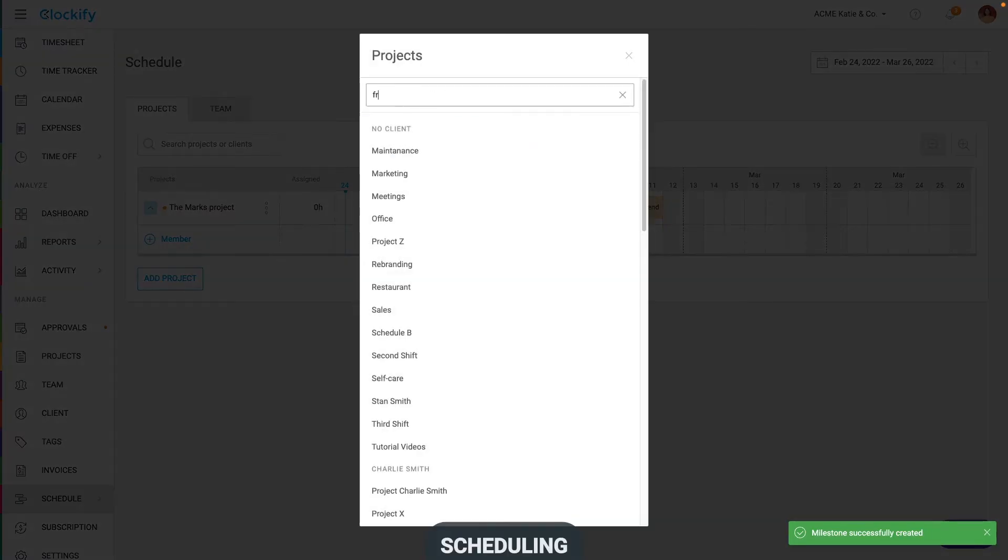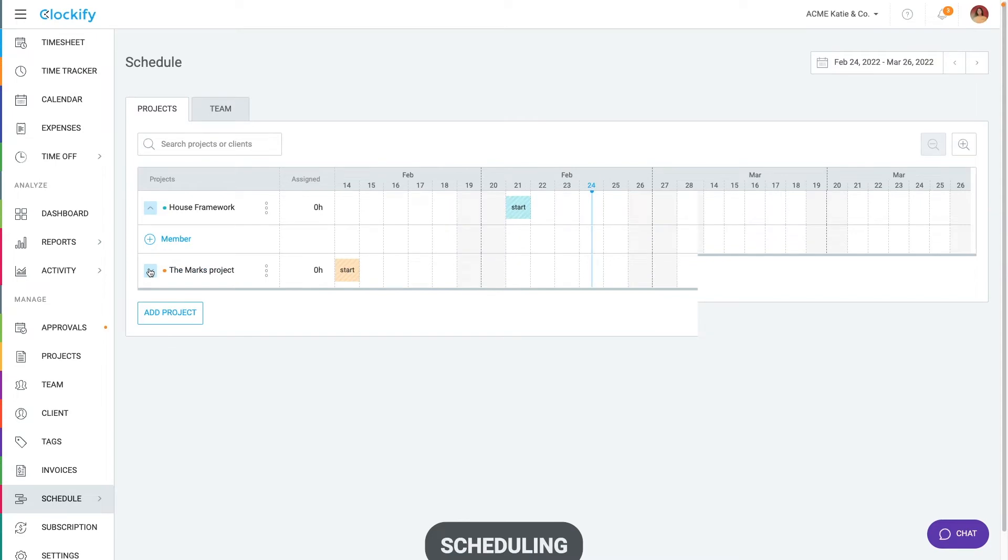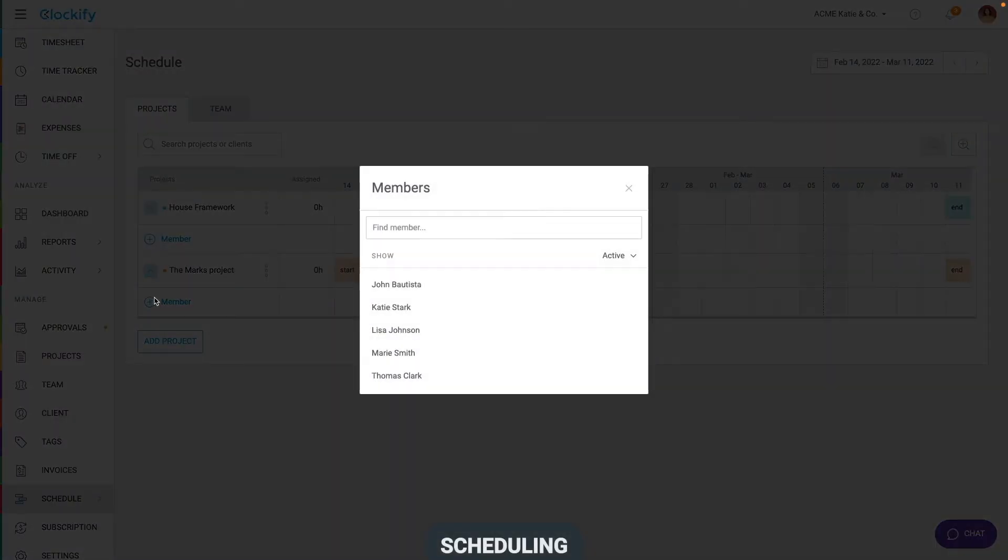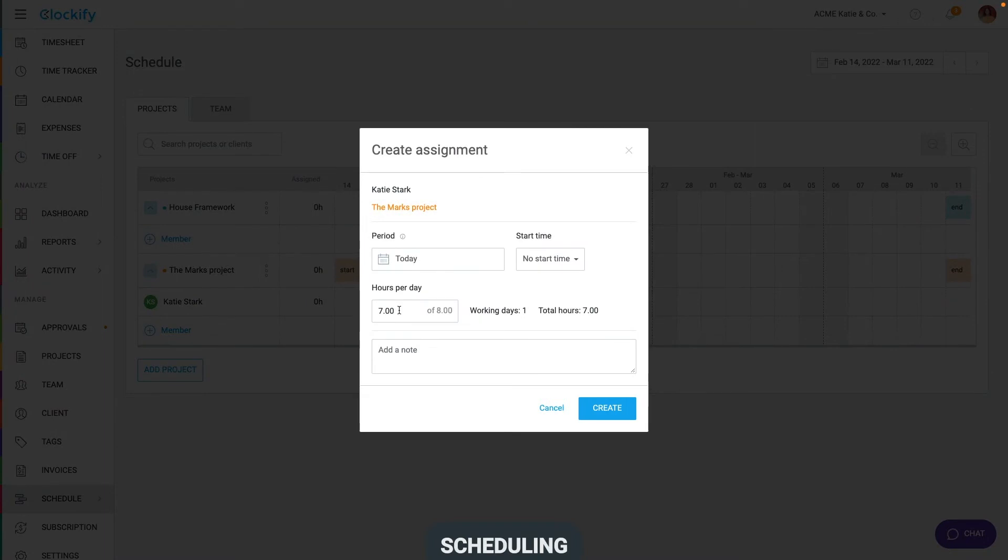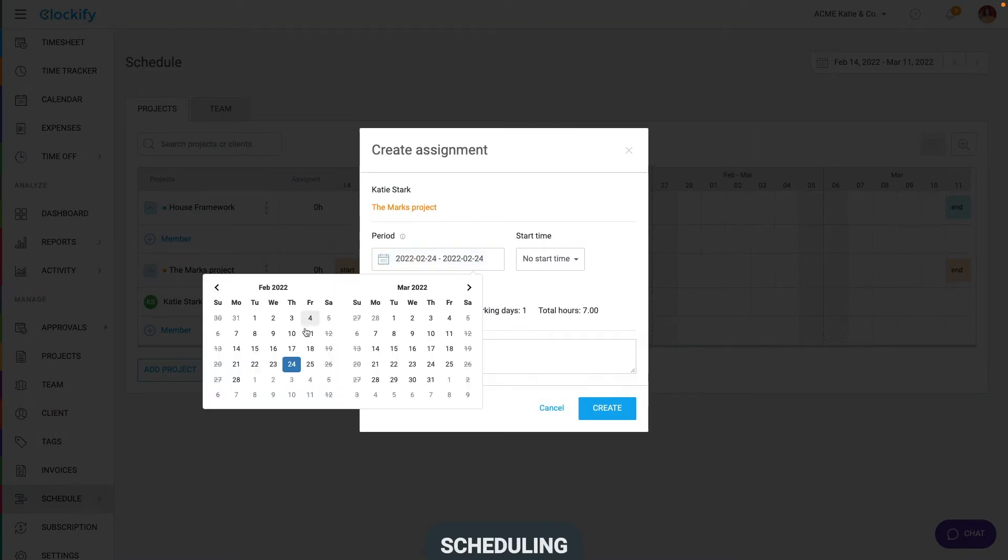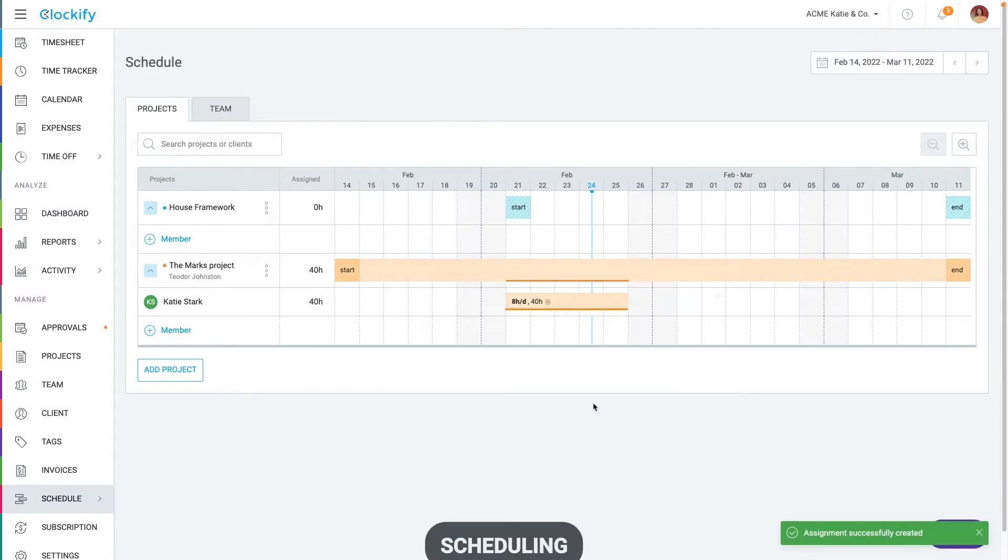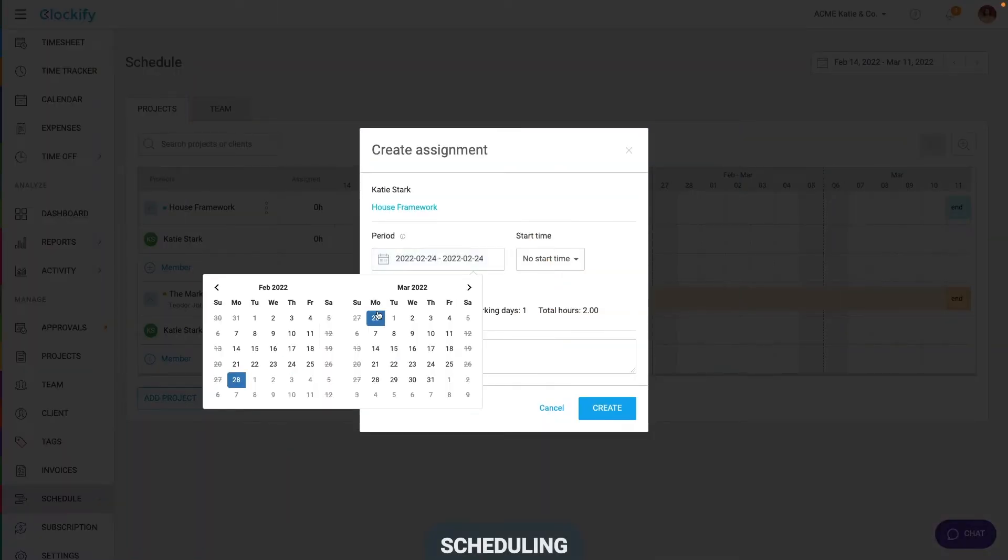Let's add another project and define end and start. Next, we need to expand the project, add ourselves and create two assignments. On the first project, we'll work this whole week, eight hours a day. And for the other, we'll schedule two hours each day next week.